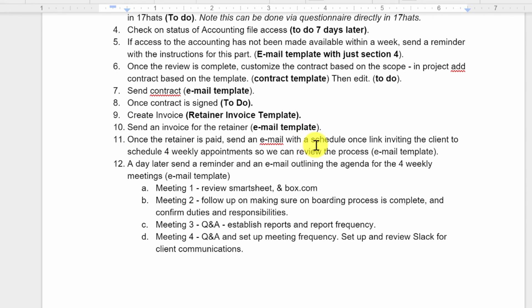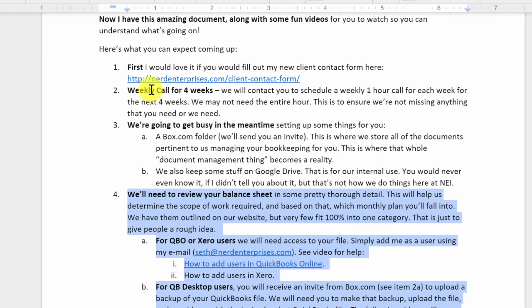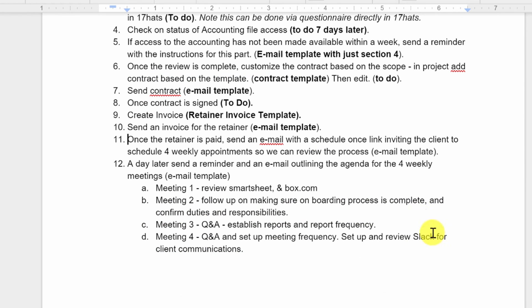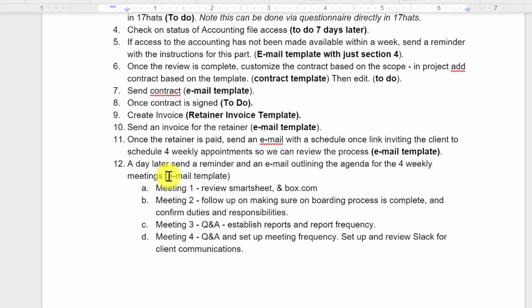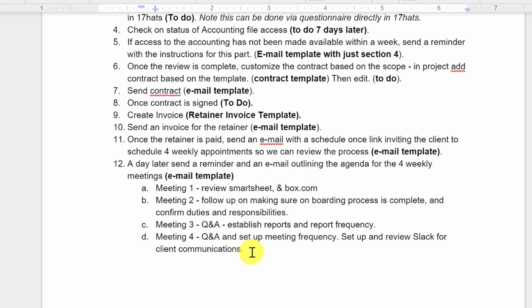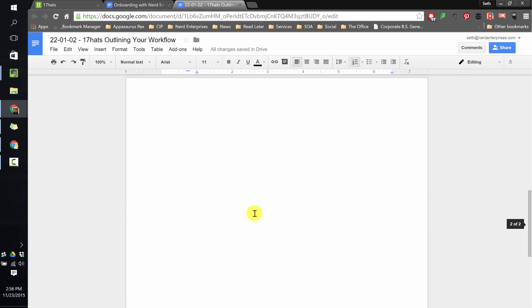Once the retainer is paid, we send an email with a schedule once link. Schedule once is a service I use for scheduling. So that the client can set up those four weekly appointments that we referenced higher up in this document right here. So what that means is we need an email template. That's just going to include the link and says, hey, thank you so much for paying the retainer. We're now ready to get started. Please use this link to schedule the four appointments that we're going to have on a weekly basis so that we can make sure the onboarding process goes as smoothly as it can possibly go. A day later, if they haven't followed up on this already, because this is really important to get this going very quickly. Otherwise, you kind of lose traction. Next thing you know, the client says, oh, I never heard from you. I hired somebody else. So a day later, we're going to send a reminder. And then we're also going to expand on it and say, and by the way, here's the purpose of these four meetings. So if they thought maybe it wasn't a big deal or that important, now they'll see the importance of it when they see this email that goes out to them a day later.